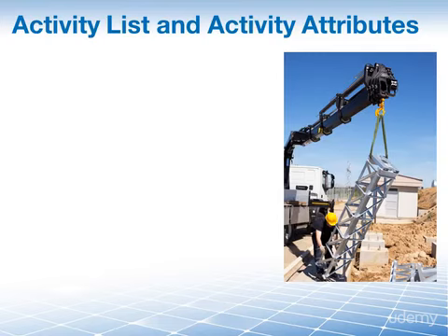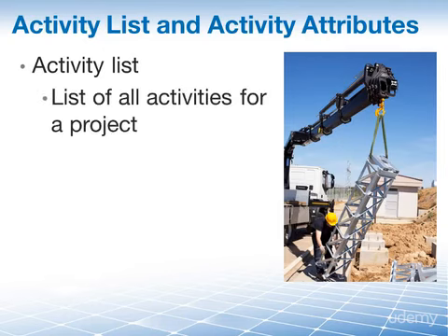Our third output are the project document updates, and two of the project documents that may have to be updated as an output of the estimate activity resources process are the activity list and the activity attributes. The activity list is the comprehensive list of all the activities that are required to produce our deliverables, and maybe by assigning resources we figured out something is missing, there are typos, things are too much, we have to change things around.